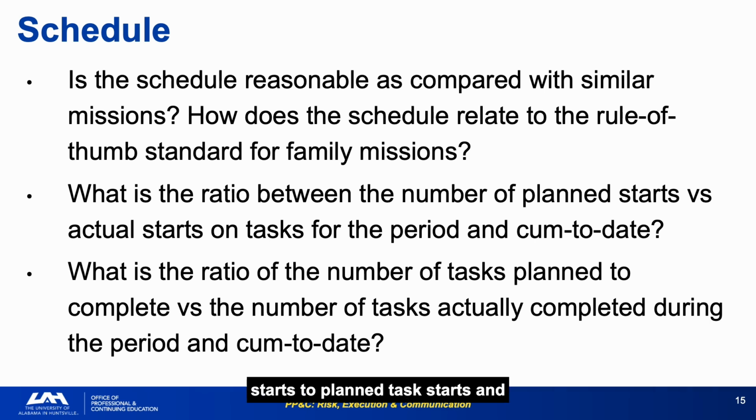Comparing actual task starts to planned task starts and comparing actual completions to planned completions are the BEI and CEI calculation from Course 3, expressed as checklist questions. The connection between the metrics and the questions is deliberate. If you built the BEI and CEI habits from Course 3, the scheduled checklist questions should feel like reinforcement. If you did not, use the checklist questions as the entry point into those metrics.